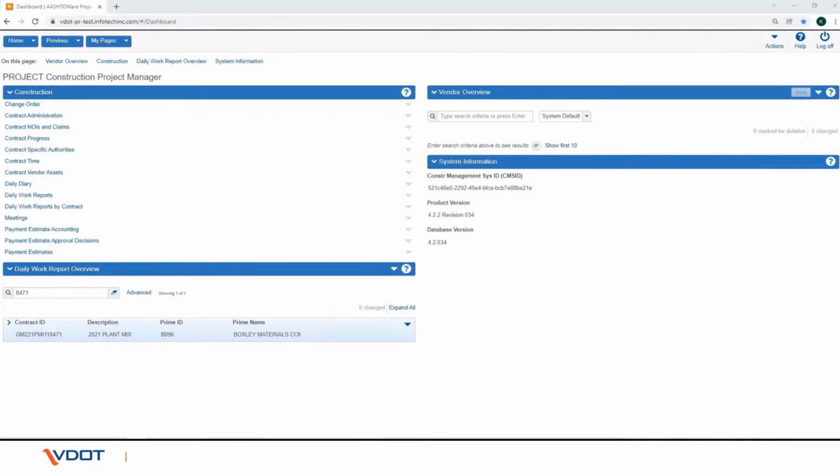In this video we will walk you through the process of creating a payment estimate. You can add a payment estimate for an active contract only after the execution date and the notice to proceed dates have been entered in contract times informational.